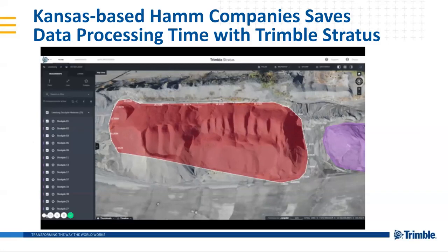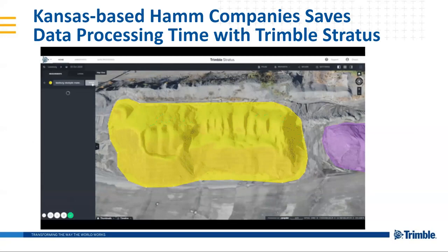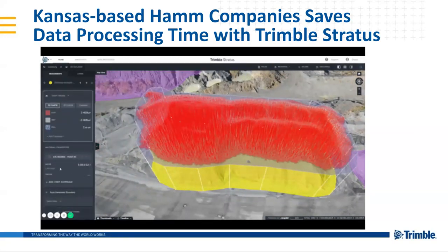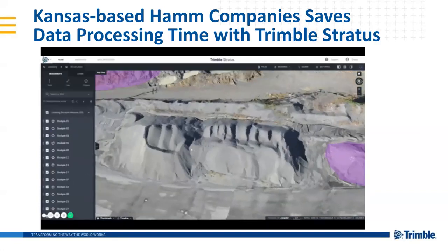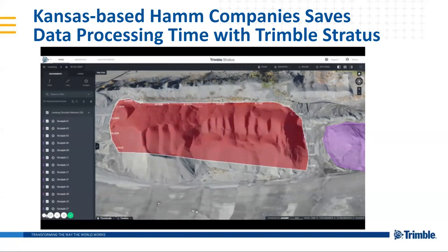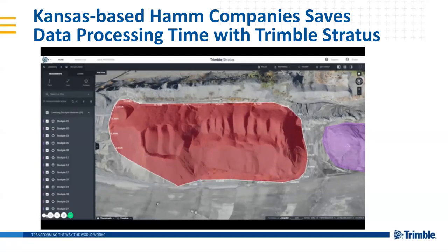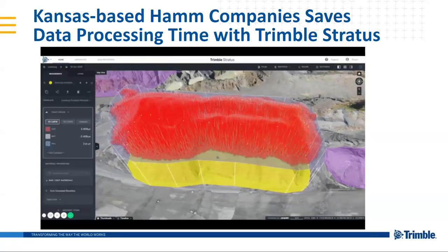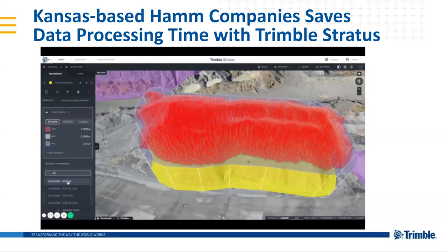So this is a quick look at that stockpile tool. Again, it's going to be run under that polygon. You simply circle the edge. We use our smart volume tool to catch the toe of the stockpile. And then from there, we're going to get that entire volume of that stockpile. And then if you go one step further, you can actually import some material properties regarding what you're bringing on site or what you have on site, and go from yardage to tonnage, tonnage to dollars. So you have the ability to do that, spit out a report, and it's all done much quicker than, especially, walking a stockpile.